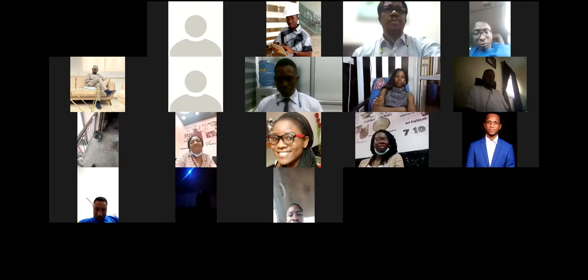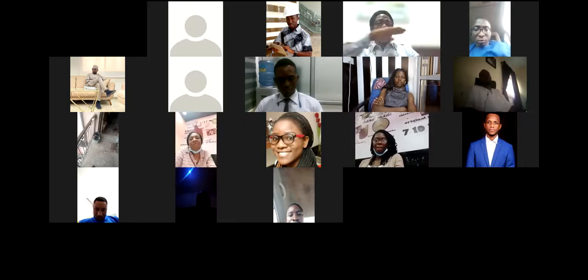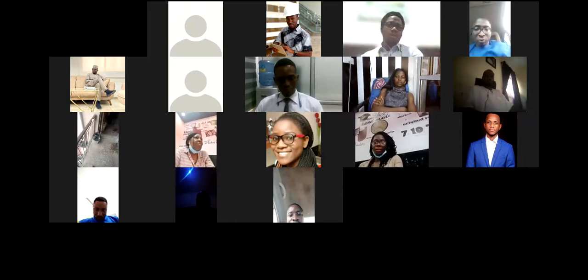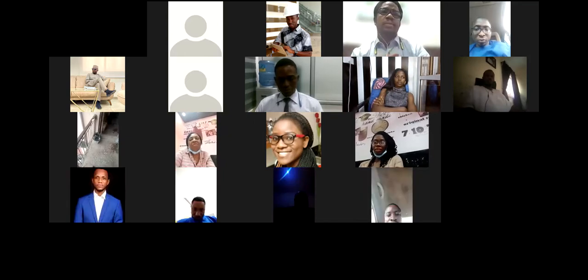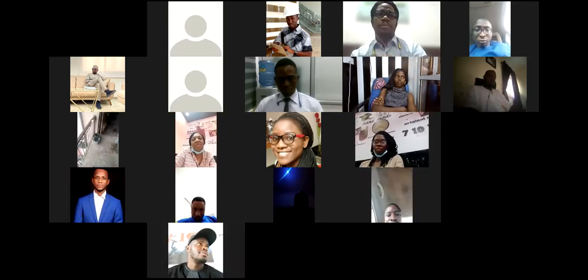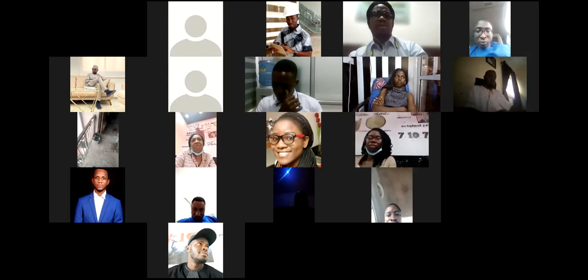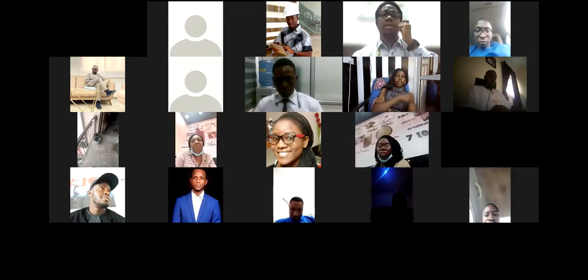Thank you. So you can actually have an FCI for each system. You can have a total FCI for your whole facility. That is repair cost over replacement cost. Yeah, that ratio is your FCI.